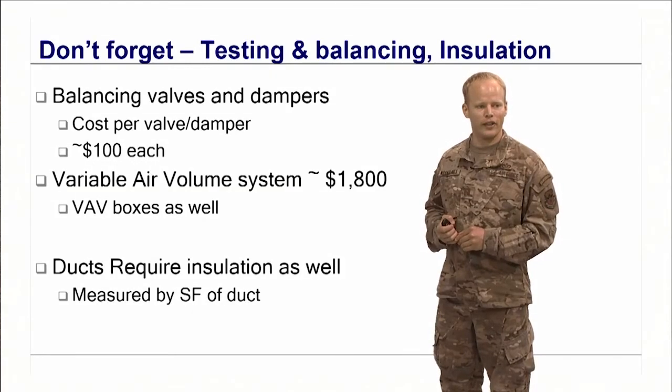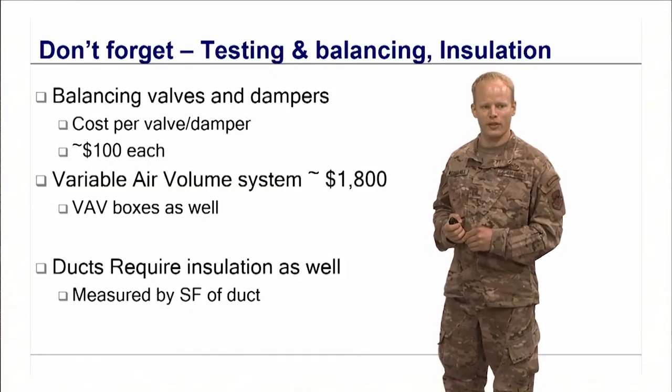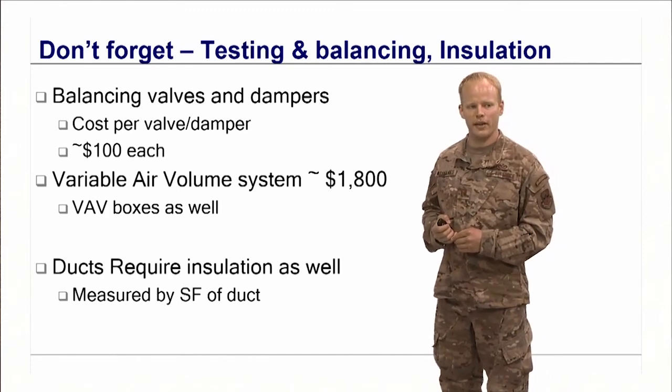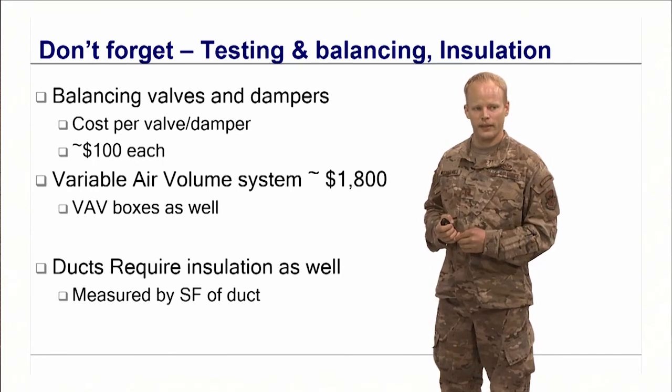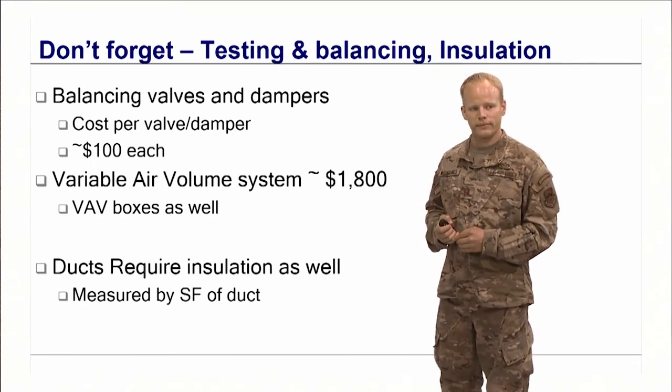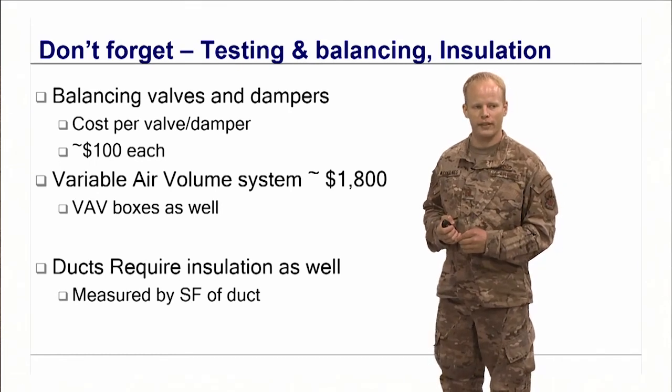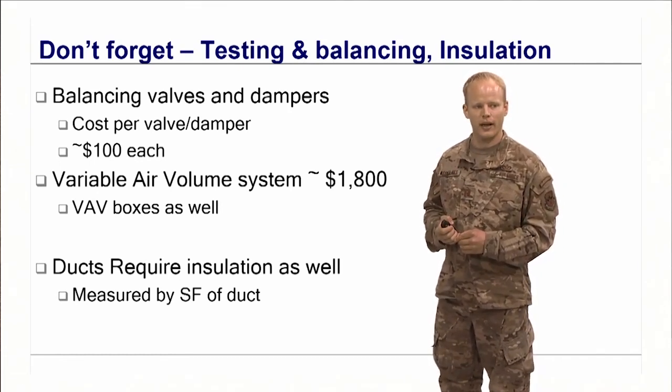Yeah, the quick look was $100 per valve and $100 per damper, $100 each. So it seems a little high to me, but it can add up quickly. So check your RS Means. I did a quick sample there to find out a general cost.